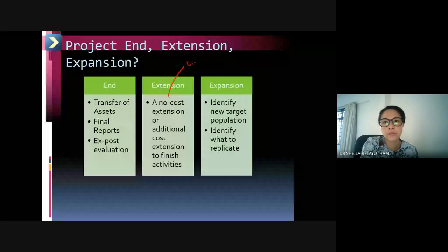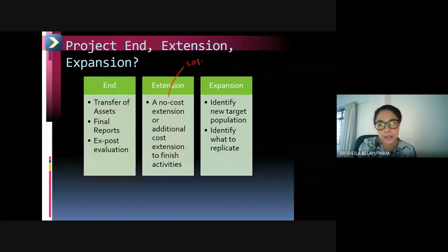Okay, so you have been given the extension of time. So as a contractor, if you are towards the end of the project, your date of completion may be 30th June. But on 30th June, you have not concluded. So maybe you are left with 2% of the work. So of course, you are not applying on 30th June. Okay, so you will be applying for the extension of time earlier.